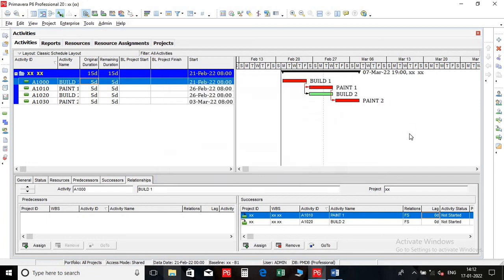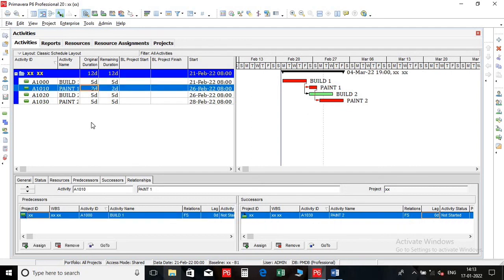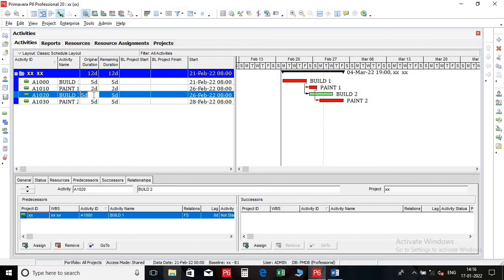Let's discuss how lead becomes a problem. Imagine the painting of the first part. Our initial estimate was 5 days, and it happened to finish in 2 days. What happens? Our painting has finished even before we finish building the wall, which is not logical. This example shows what I told you before, that schedules which use leads are harder to manage. You believe that you have to use lots of leads, especially large leads. You might need to reconsider the way you design relationships.